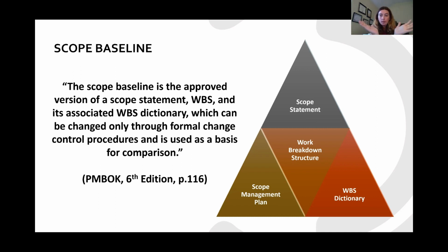If along the way, any of the stakeholders or anyone in the team decides to do something different, there should be a change control in place. And all the time, any changes you are going to make to the project, they will make reference to this scope baseline, okay, which is actually the scope statement and the work breakdown structure, okay?